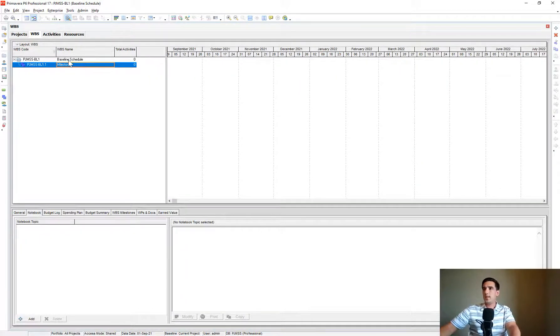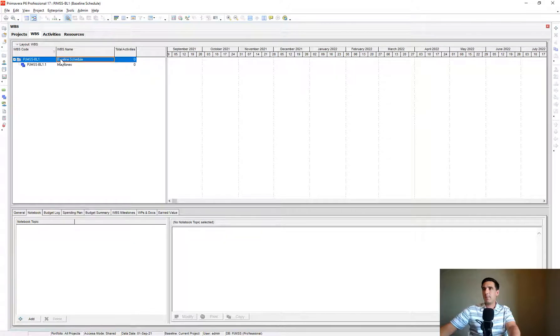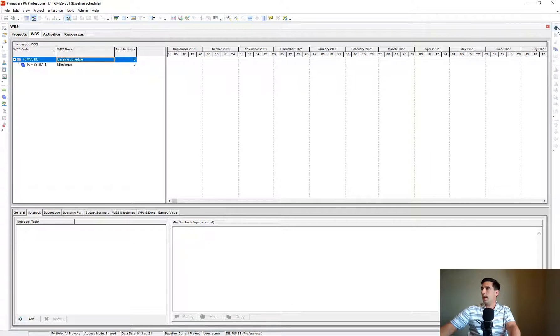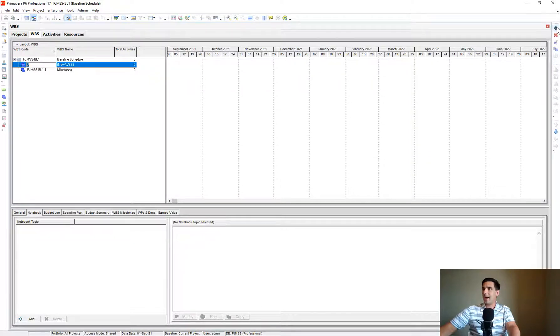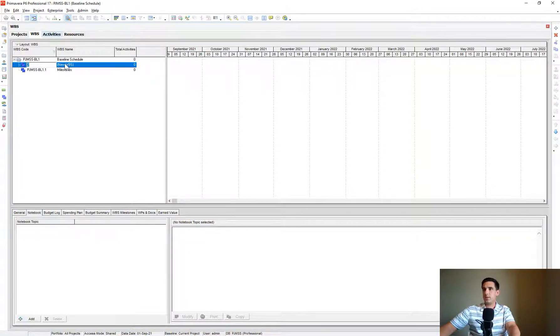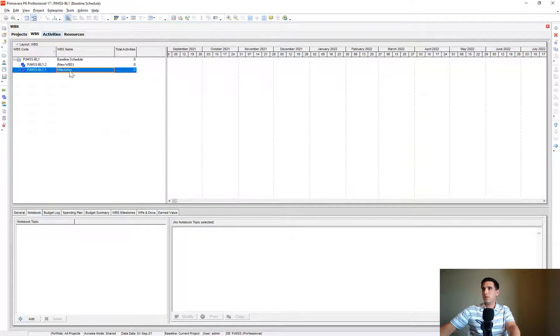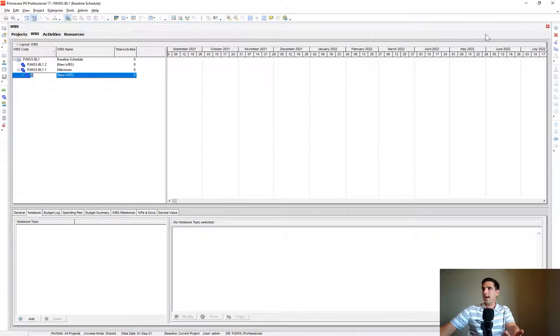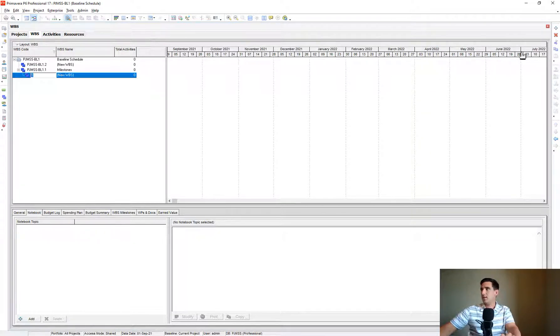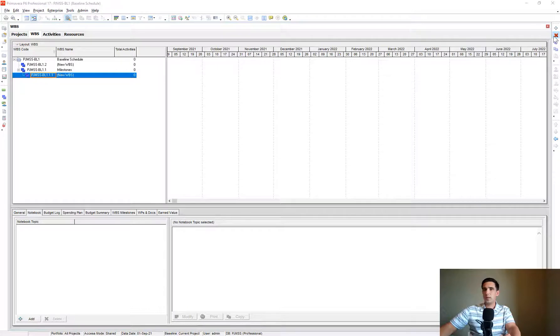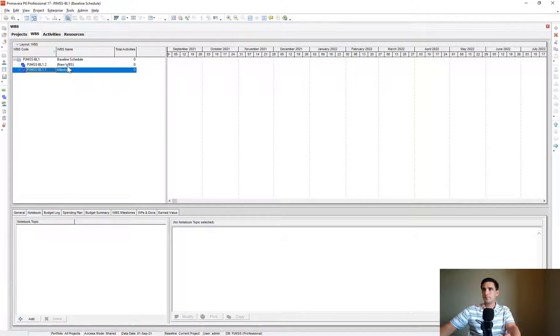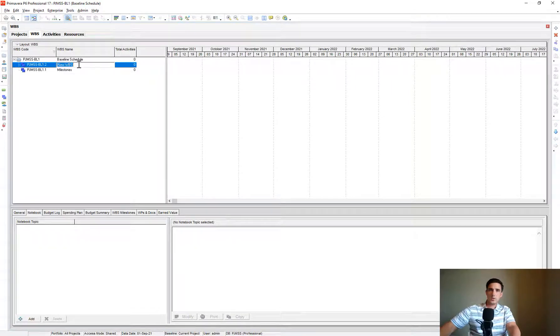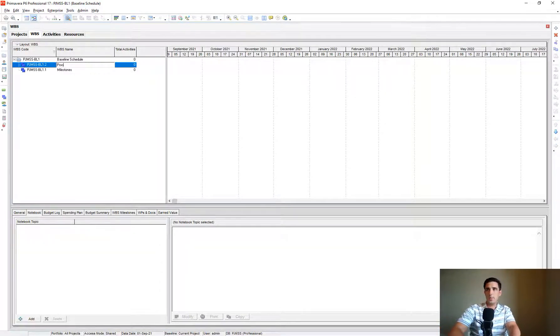Then I click back on the Baseline Schedule on the top row and I click Add because it creates a child underneath Baseline Schedule. Wherever I'm clicked on the WBSs and I click Add, it's going to create a child to that section. Let's go ahead and delete this guy. So it created a child.